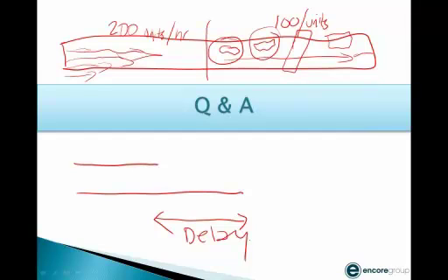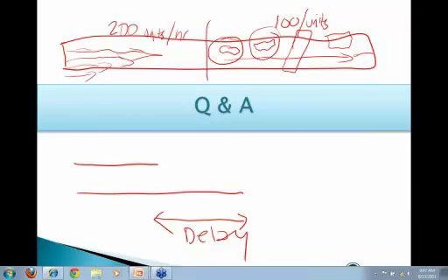Now that, once again, Charles, in your question, that's a little different from the early completion portion of it. The early completion is dealt with in a different way. And those questions, if you request the handout from this, I've got those issues detailed on that early completion slide that shows, to get an early completion schedule, the contractor needs to be able to demonstrate that they intended to complete early first, they could have completed early. In other words, we were getting our production, but because of this delay, the third justification, you have to be able to show that we could not finish because of this delay. Okay? If you have any more questions on that, feel free to just contact us and let us know.